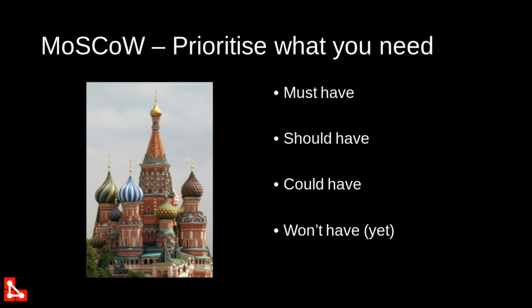So let's say you're building a business system. Let's say 2 years ago, you're building a business system or implementing something. And all of a sudden, the government comes in like, oh, you must have now single touch payroll. Okay, you need to deliver that, and it needs to be in a certain time frame because you got to comply with the law. You only have a few months left. You can't sacrifice any of the must-haves that you already have to deliver because again, it's business standstill. But what you could do is say, okay, I'm going to move in the single touch payroll, but from a similar amount of effort, I need to move out or move to a lower priority some of the should have and could have items so I can still deliver that and comply to the law.